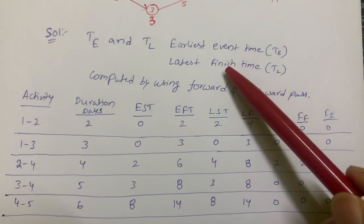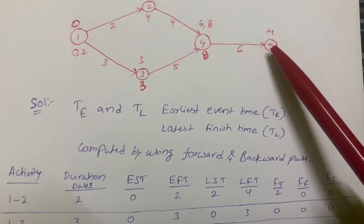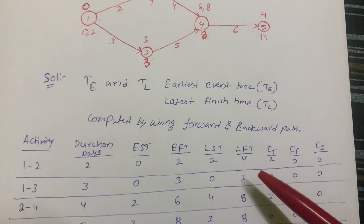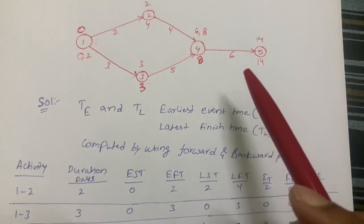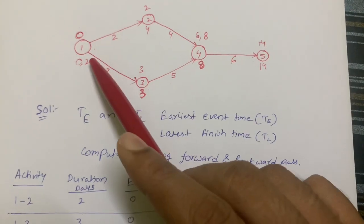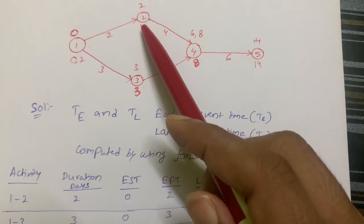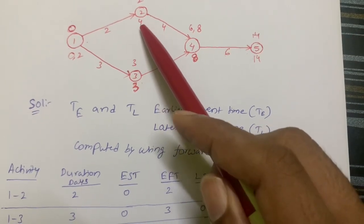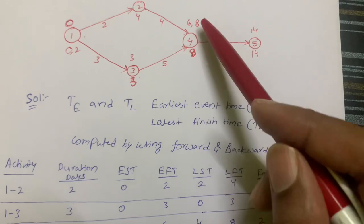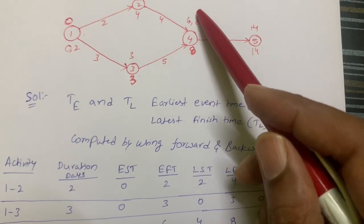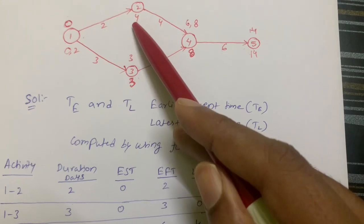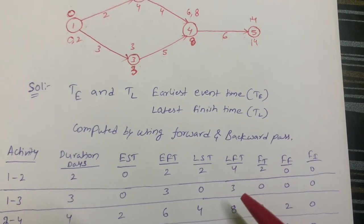Now we calculate LFT (latest finish time) using the backward pass. For activity 1-to-2, at this junction we get two values and we must consider the maximum value. So LFT = 8 − 4 = 4. The latest finish time for activity 1-to-2 is 4.